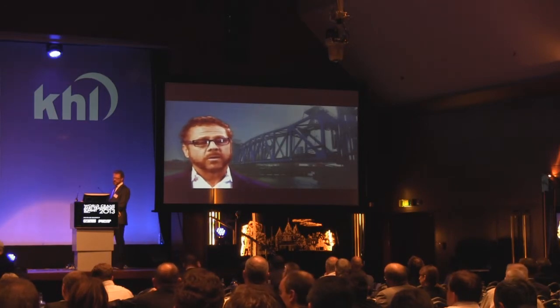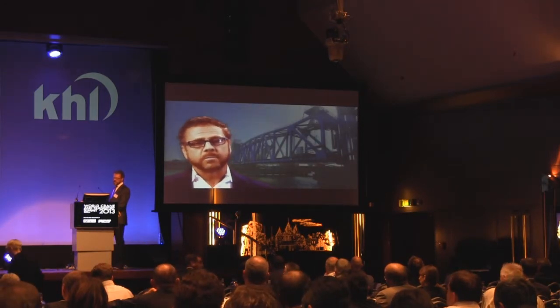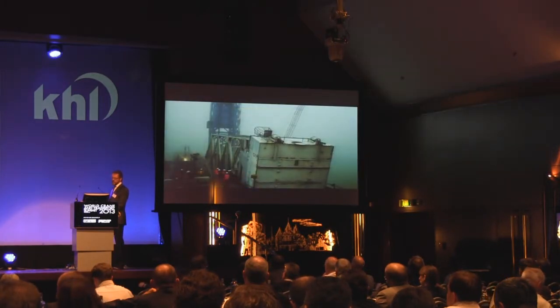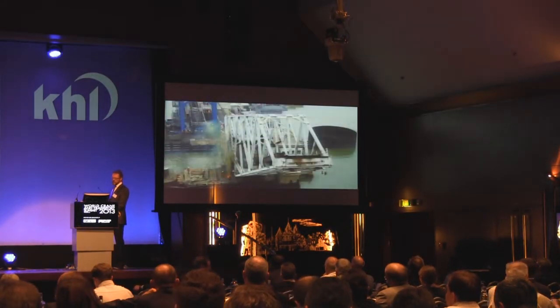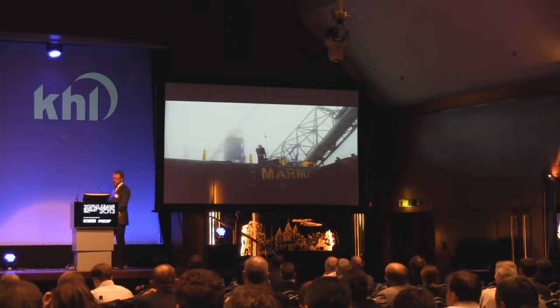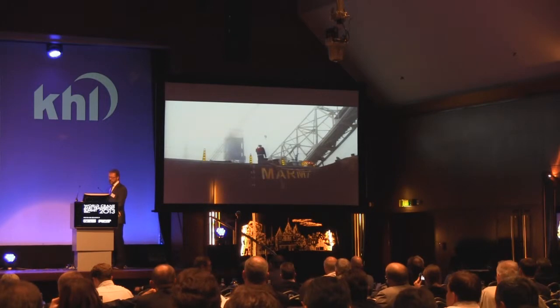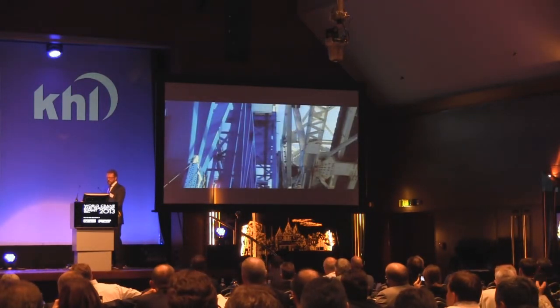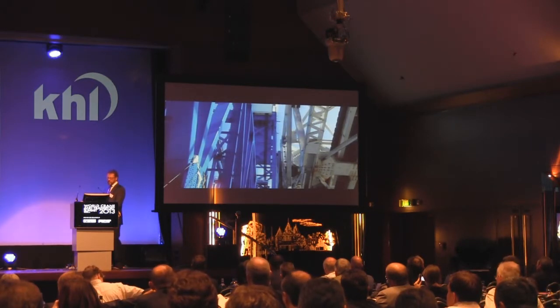At that point, we had to also be concerned about the existing Bascule Bridge that had been lowered to a 30-degree angle and then one of the two pinions had to be removed before you could gain clearance for the new bridge. It also put it in a vulnerable position. If we bumped it ever so slightly, it could be disastrous. So we had to be extremely careful to make sure that didn't happen as well.